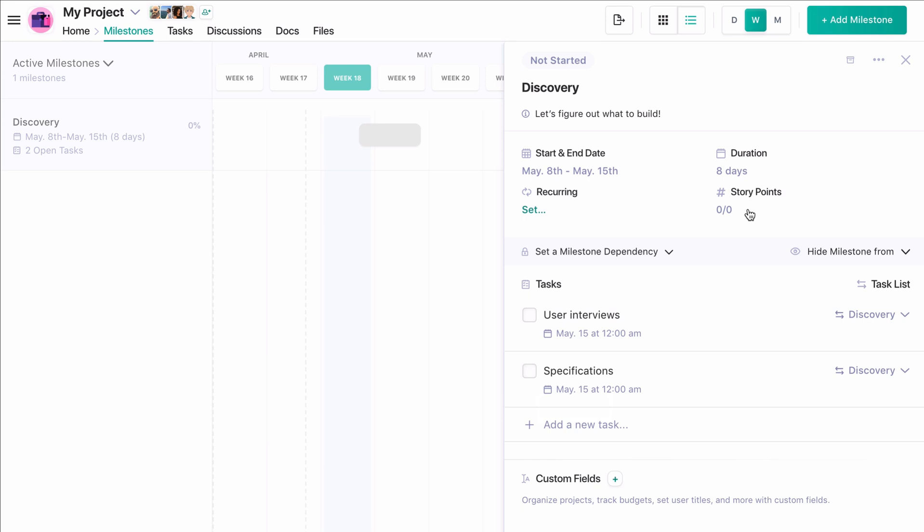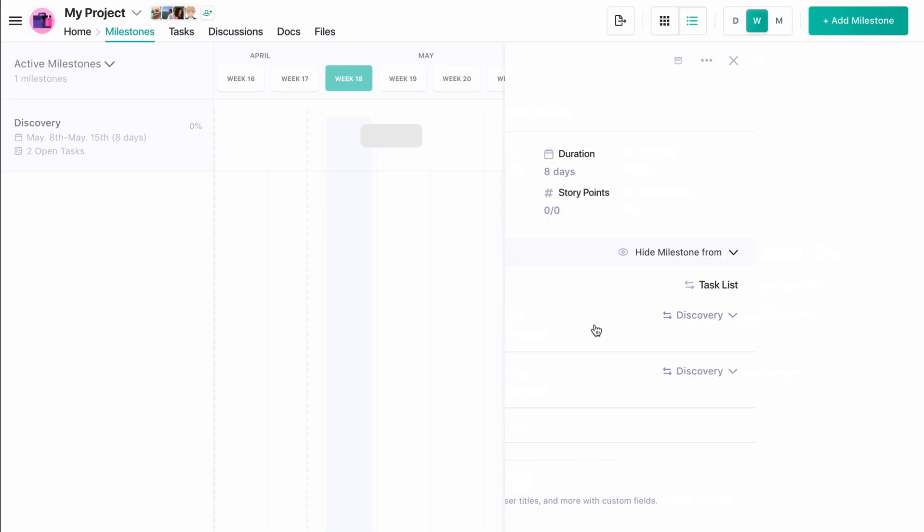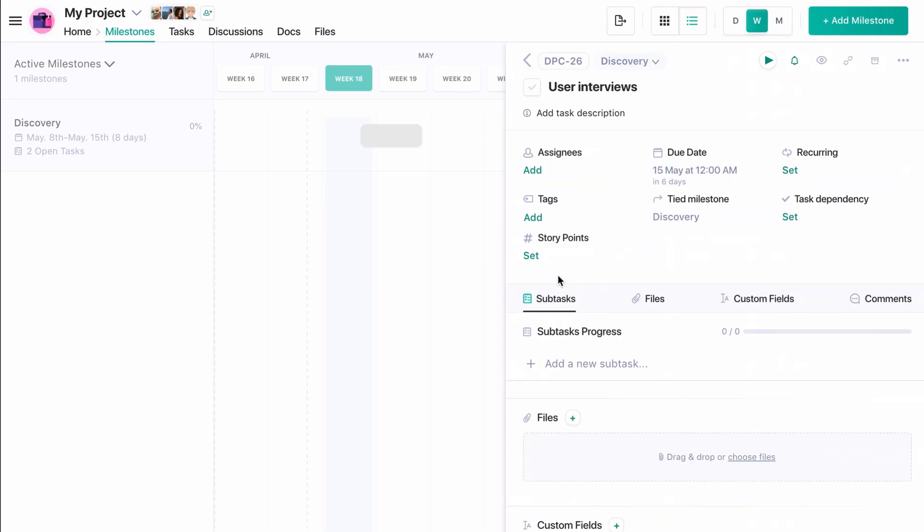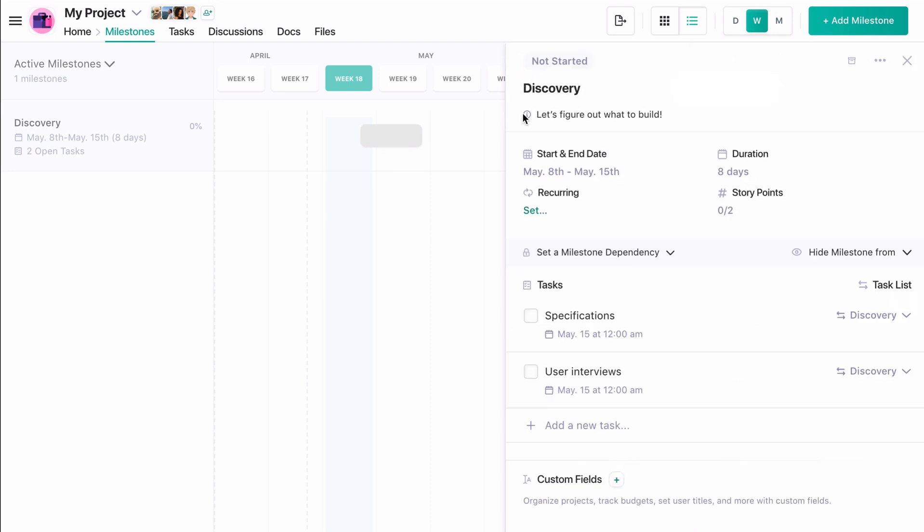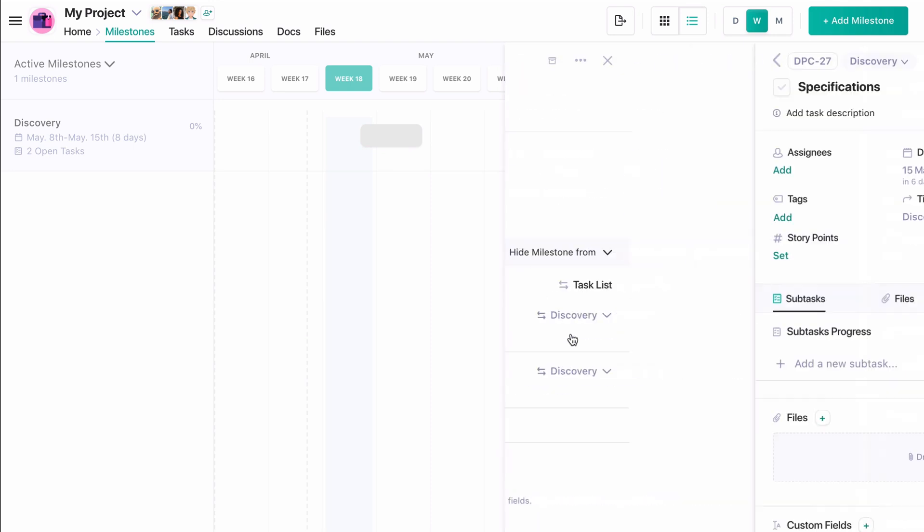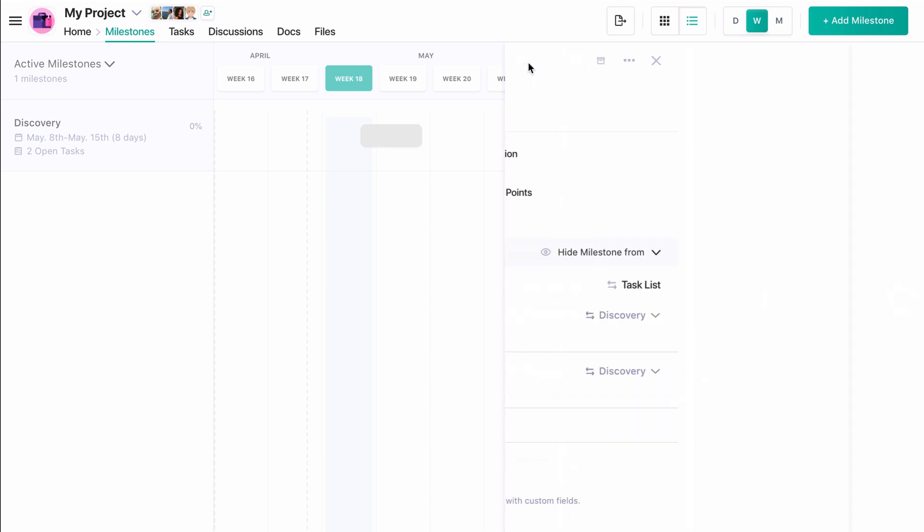For example, let's say user interviews will take roughly two days. Let's give it two points. And let's say specifications will take three days. So we'll give it three points.